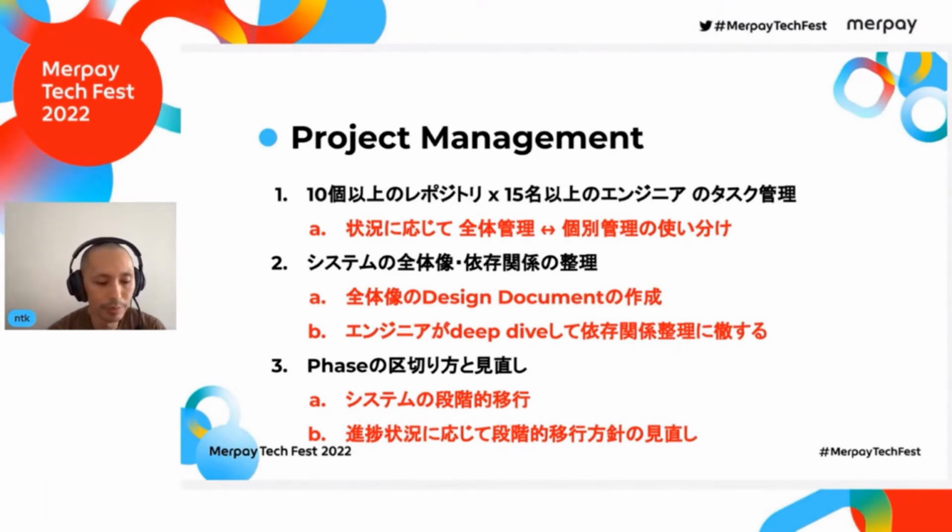For example, the original plan was to complete the database and data aggregation system migration by the end of the year. But since we had difficulties in the database migration verification, we made this top priority and canceled the year-end migration. This shift in schedule had an impact on the migration plan through the spring. Therefore, the plan was revised accordingly by identifying and reviewing the scope of the system to be covered, reviewing the scope of the re-architecture.